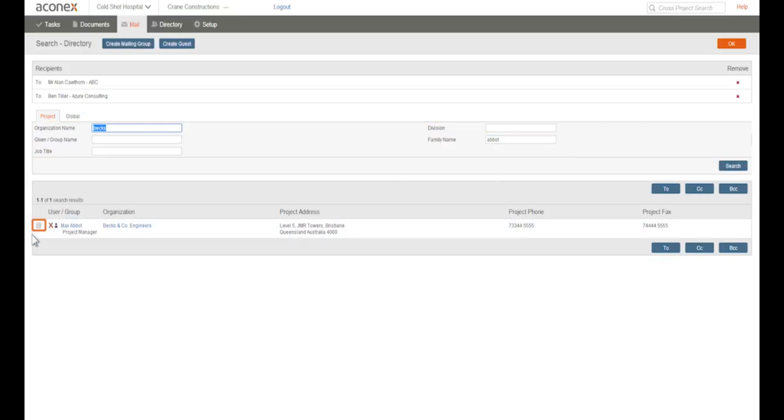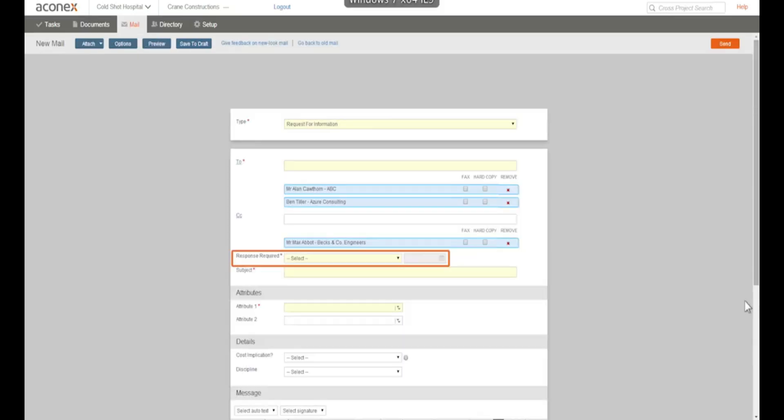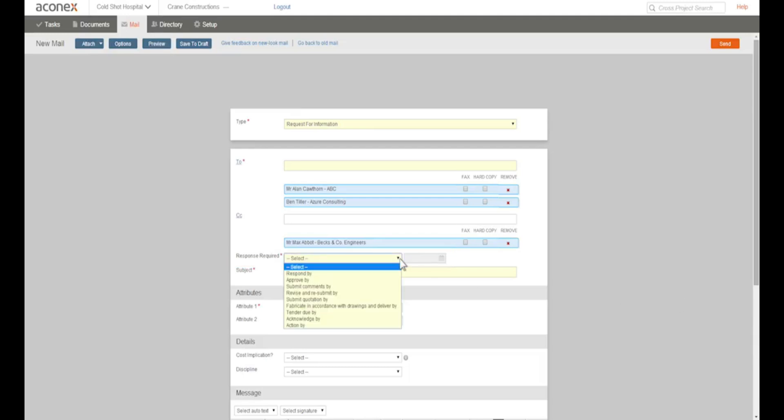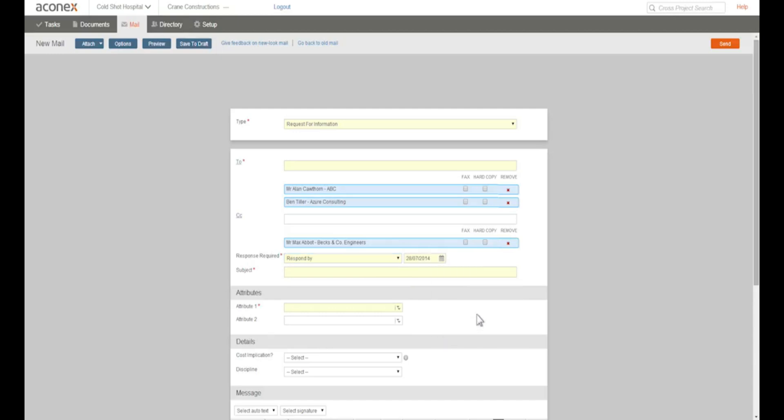Not all types of mail need a response but we'd like a response to our RFI. So we'll choose respond by and set the date we want an answer by. For example, your project instruction could have agreed time frames for RFI replies.